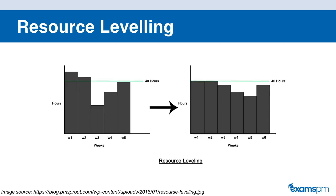Let's start off with resource leveling. You use resource leveling when you have limited resources and you can extend the schedule. Resource leveling is used when a critical resource may not be available for a certain period of time or duration, or you have to share a resource with another project — the demand for the resource basically exceeds the supply. As we can see on the left-hand side of the graph, in weeks one and two, the resource is working more than 40 hours a week in order to complete the project.